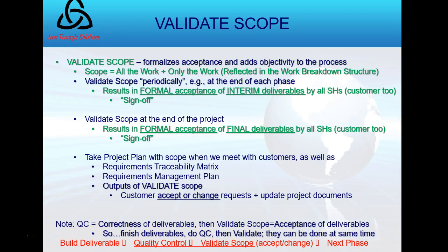And if you look at page 25 and look under the control process group, monitor and control, and then find the scope management knowledge area, you'll see that there are two processes used to control in scope management. There's validate scope and, of course, the standard control scope.